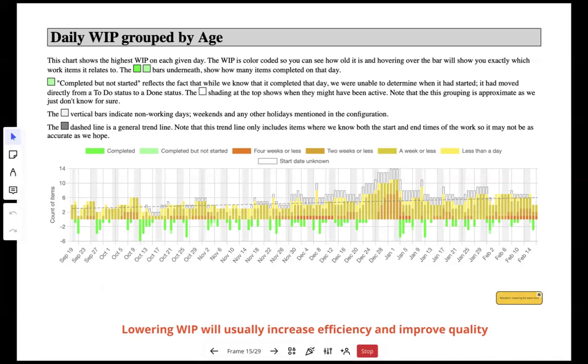So you're kind of pointing out Little's law there. Sorry, say that again? Oh, you're pointing out Little's law. The more items in progress, the longer our cycle time. Yes, and I think that the CFD is probably the best view for that. They all give us a slightly different view, and having multiple different charts that look at the same data the same way can be helpful. But yes, you're absolutely right. We're showing the relationship of Little's law here.